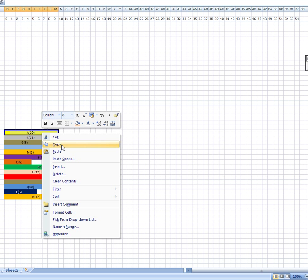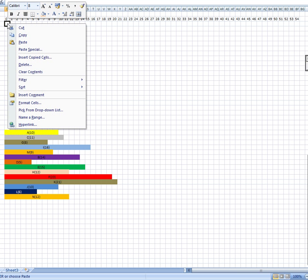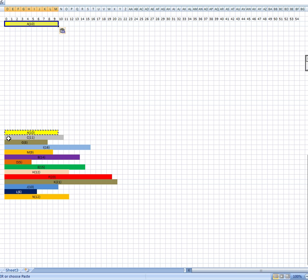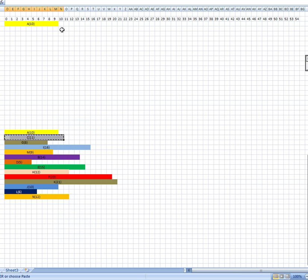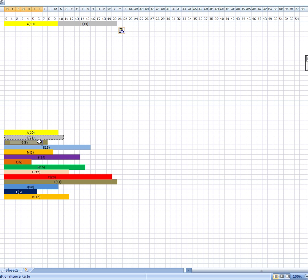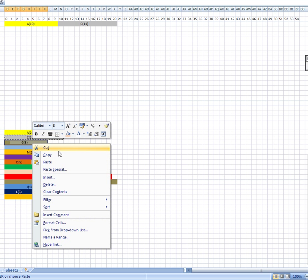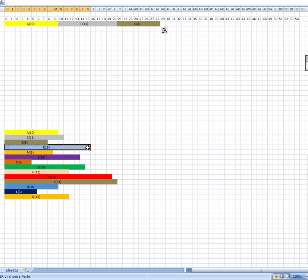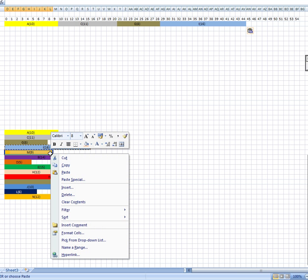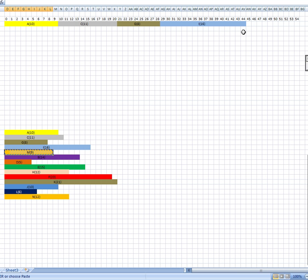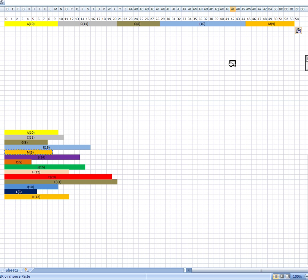Now, to show how to do a Gantt chart, I'm going to start by filling in the most urgent things to do, which are the critical path. A must start and finish at certain times. C must start at 10 and finish at 21. So I'll take C and paste it in here, start at 10, finish at 21, and so on, until we've got all the critical activities in place, like this. So there's no room for maneuver with these critical activities. That's one of the critical paths. There's another critical path.